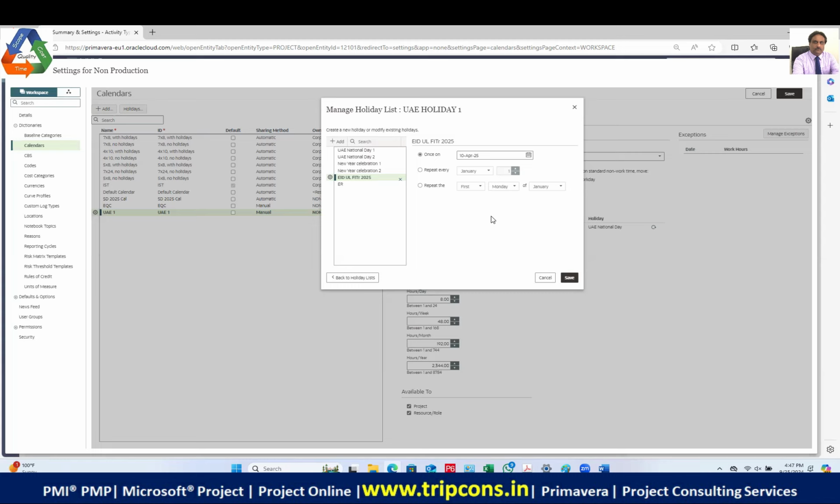Suppose I put it on the 24th, and the next year I put it on the same date. But when I reach the next year and get the list from my HR, I will adjust the date. My finish date for the project will remain constant. Have you understood the logic? Yes, sir. Okay, very good.